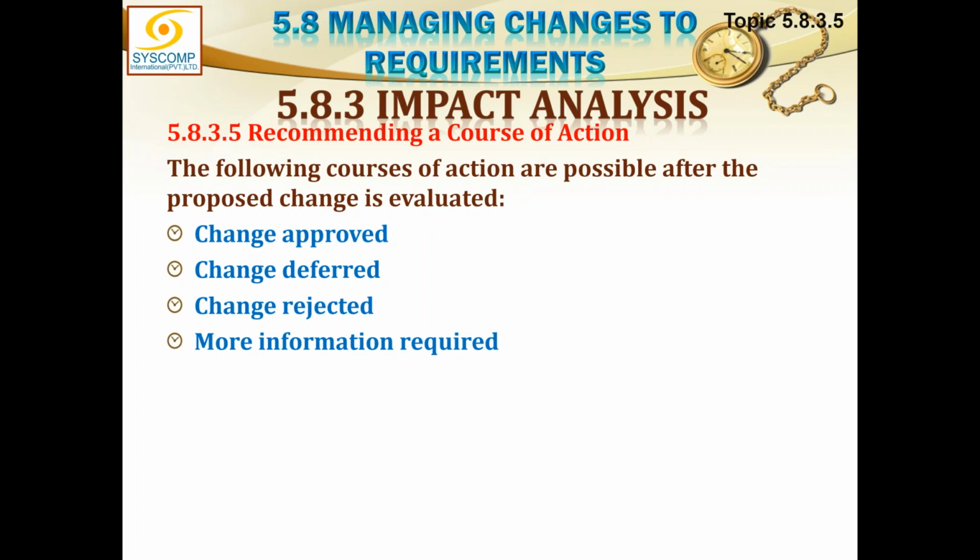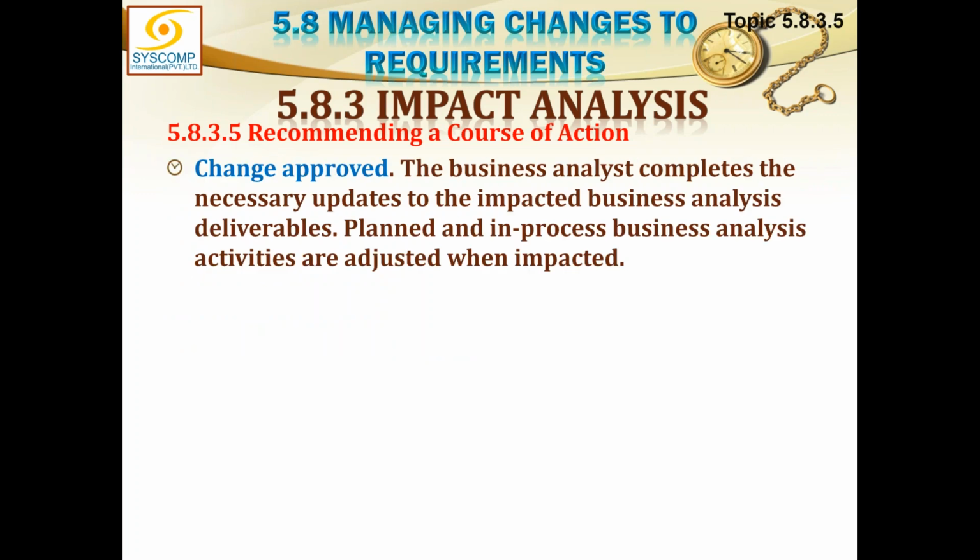Then, recommending a course of action, the last point. The following courses of action are possible after the proposed change is evaluated. Either the change is approved, deferred, rejected, or maybe it needs more information. If the change is approved, the business analyst completes the necessary updates to the impacted business analysis deliverables. Planned and in-process business analysis activities are adjusted when impacted.